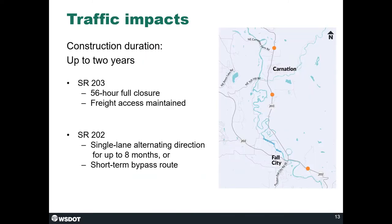Regarding traffic impacts — and these are not finalized options — on SR203, the unnamed tributaries to Horseshoe Lake and the Snoqualmie River may require a complete closure of the highway for 56 hours, about two and a half days. Construction techniques proposed by a design-builder could result in fewer lane reductions and road closures, but this is based on what we know right now.